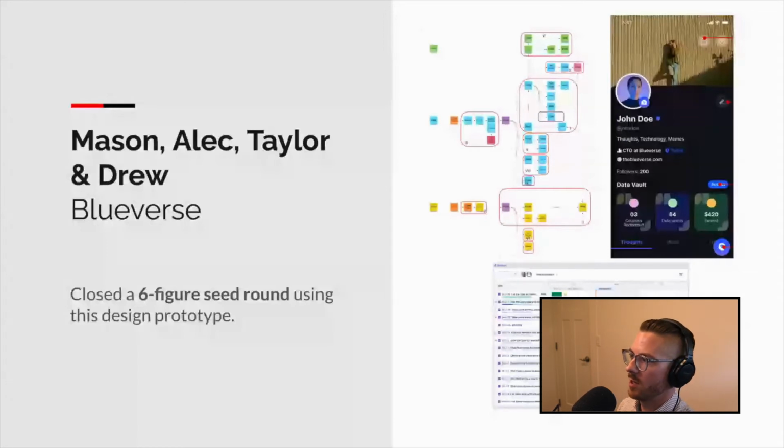We did this process with them. Again, here are some examples. This is a design at the top right. Here's a list of the user stories, actually in Jira here. These are actually the higher-level ones. If I had opened these up, you'd see the individual ones in there. You can see some of the numbers there. For their initial MVP, which is only one little red square of the story map above, we had 85 stories for a very small portion of the app. That gives you an idea of how detailed these user stories get. It turned 1, 2, 3, 4, 5, 6, 7 sticky notes into almost 90, almost 100 stories.